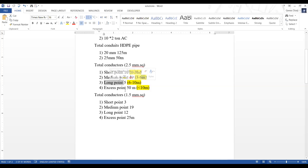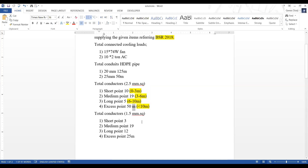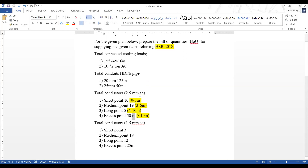For the axis point, the quantity is measured in meters, whereas for short point, medium point, and long point, the quantity will be in the point system. We also have to estimate the total cost for the 1.5mm² conductor, which also uses short point, medium point, and long point. For the 1.5mm² conductor, the distance is measured from the switch box to the electrical fittings - which could be a fan point, tube lights, incandescent lamp, or any other electrical fittings.